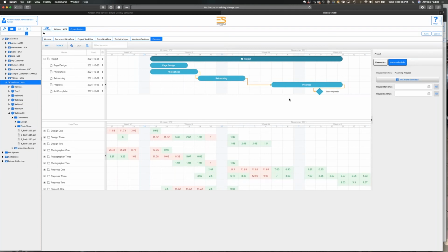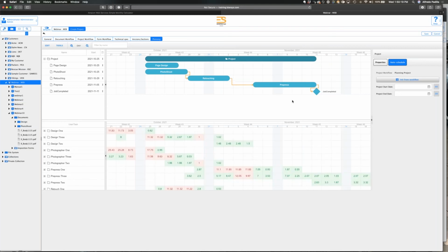And I'll just do it like that just to show a couple more things. So I can clear everything here and start over and manually do it. I can do what they call save baseline. So if I select this project and I save the baseline, I basically am locking this into this time frame. So if anything gets delayed, it's basically not allowing that. It's going to warn me. You see, everything goes red, and you shouldn't do that. If you don't save the baseline, you can do lag inside of there. You can actually have things overdue. It's just a way to lock it down. And I can clear the baseline as well.